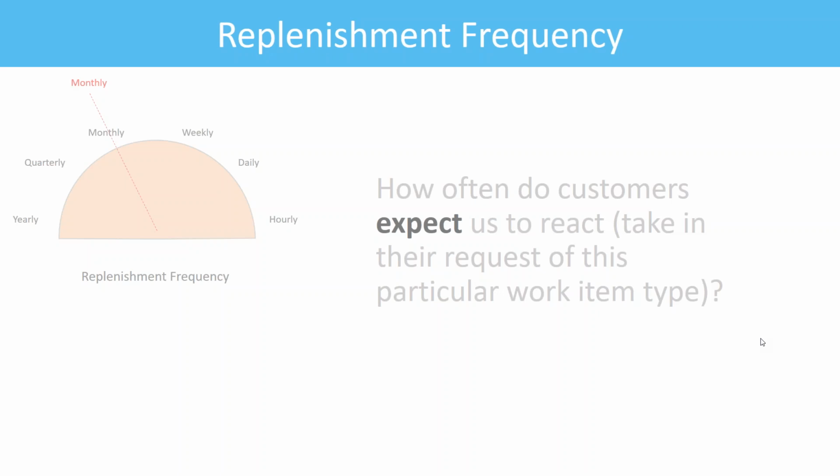Yeah, the simplest way, because in Kanban, there's a saying of start from what you're doing right now. So the simplest way is identify where your commitment line is. And then from there on, all you need to capture is just two pieces of data: when something goes through a commitment for each item, and then when it goes out of your system into the customer's hand. So with these two pieces of data, you already have the replenishment frequency, the release frequency, and the lead time. And then starting from there you can see where the gaps are.